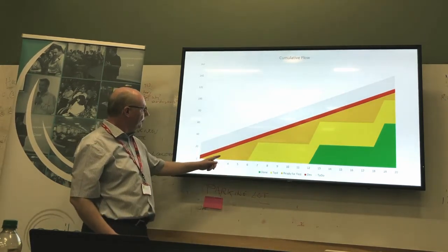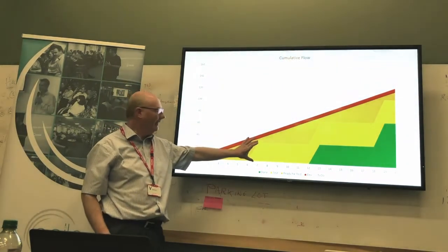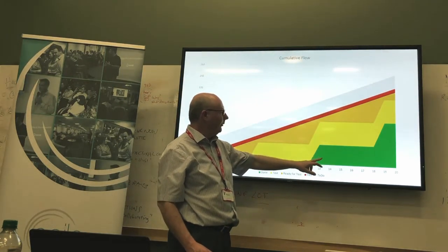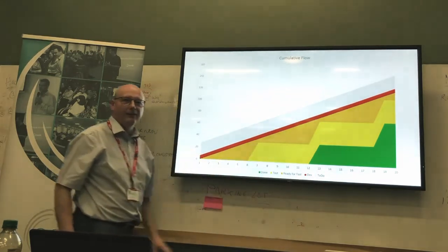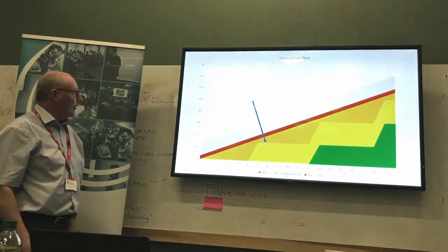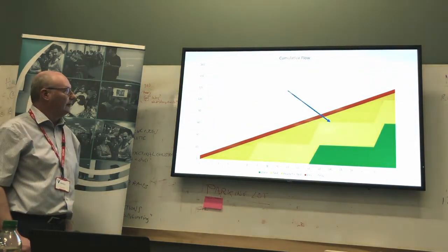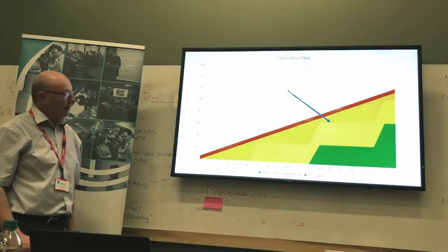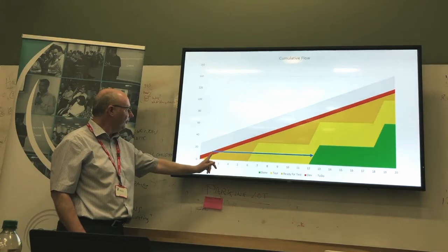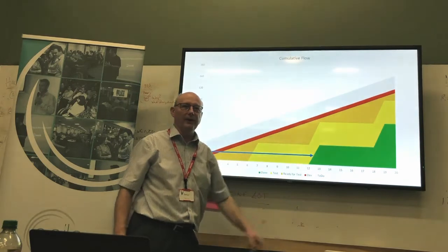So this is all the stuff that you're delivering to ready for test. And then the test team go, right, we're going to test that release. And they test it and test it and test it, and they go, yeah, okay, that's great. That gets released and they move on to the next one. Separate testing pattern. So there we go, we're just highlighting building big releases, or the separate testing pattern, and those are the big releases. And you can see that actually from starting that piece of work to it getting done, it spent most of its time waiting for test and being in that test team.